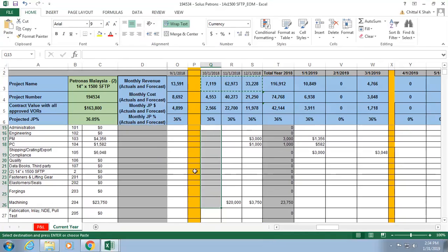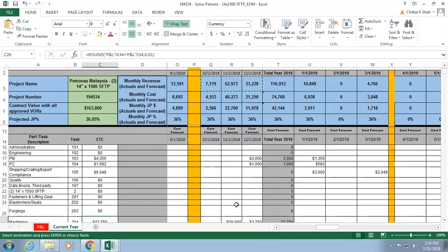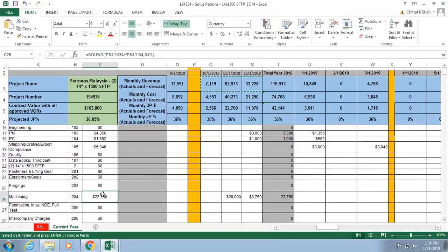And you're going to do this, take the value and spread it from this month onwards. The reason to do that is if I keep, let's say last month I had $2,000 revenue on this side, it's going to throw off my number because all I'm dealing with is the leftover amount. I'm not dealing with the already spent amount.